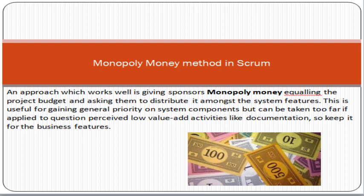When we need to prioritize the product backlog, we use an approach called the Monopoly Money Method. This approach works by giving sponsors monopoly money equal to the project budget and asking them to distribute it amongst the system features. This is useful for gaining general priority on system components, but should not be applied to low-value activities like documentation — keep it focused on business features like product catalog, customer payments, and other high-level features.